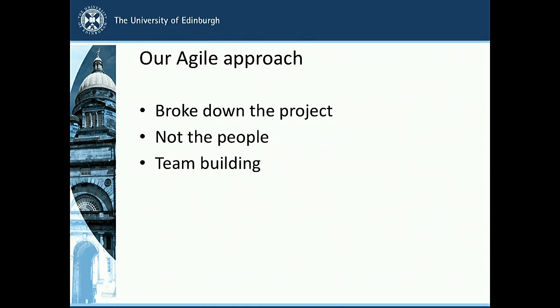So the agile approach was really to break down the user stories and the iterations into manageable chunks. We went with a 9-day development iteration because people working on the project had other responsibilities. We had 3 days a week, and the team came together for 3 weeks. So Tuesday to Thursday every week, we worked on the project together.